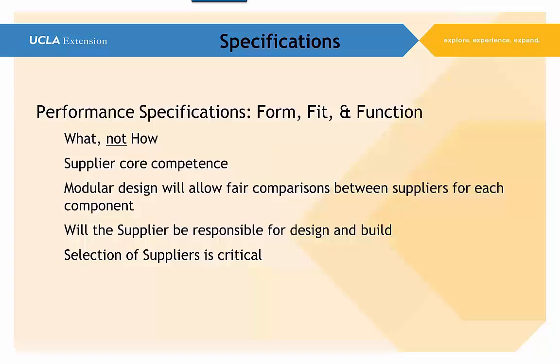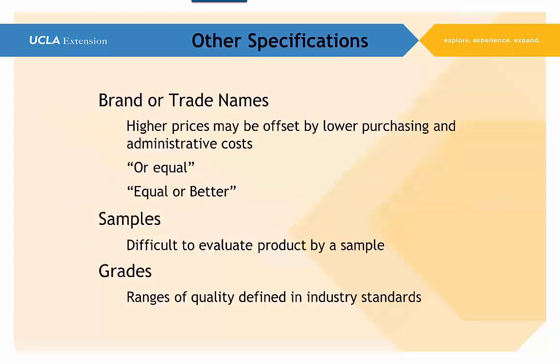Is the supplier responsible for the design and build? That's going to add a liability to the supplier, which is going to increase the cost. Or are you providing the design to the supplier and they're just going to build it to the specifications and designs that are provided to them? In every event, the selection of the suppliers is very, very critical. And you can see from what we've been discussing, if you go back and think about what I said in the beginning of this discussion today, we need to make sure that we don't take this too lightly.